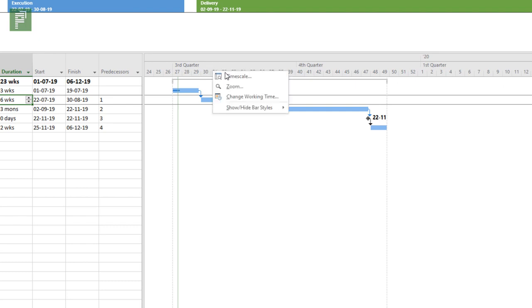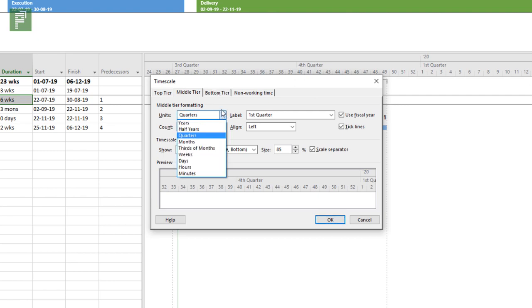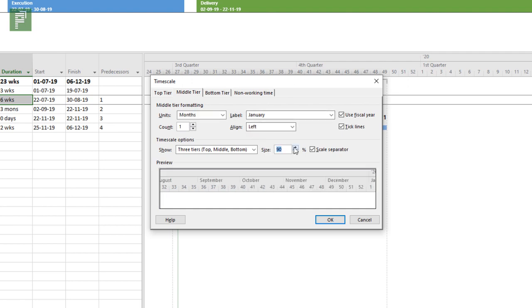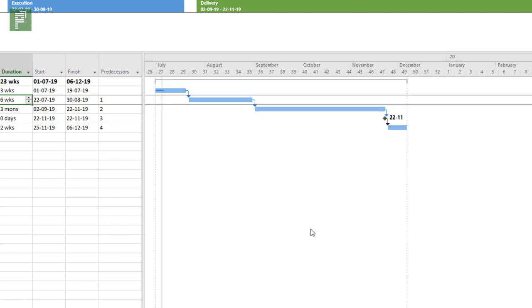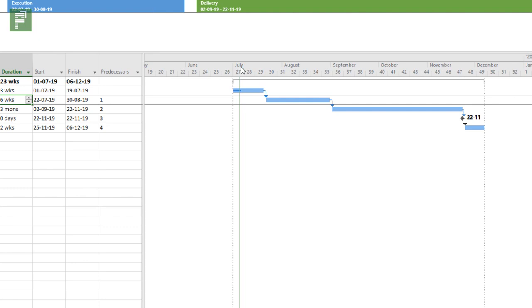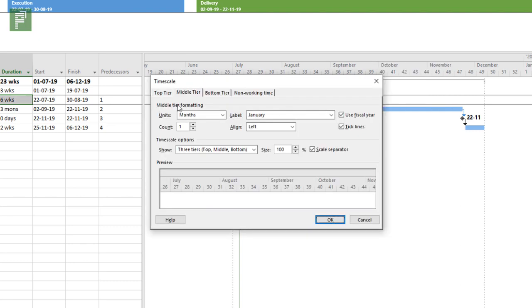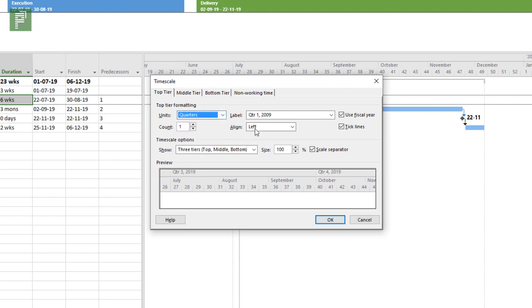So let's see what we can do more with this. I can change the middle tier to months and see what happens. I can change it to January. I just have that label there and I can have that size a bit more. Which gives us another nice overview where I would have the months and the week numbers. And I can even change the top tier to be quarters.